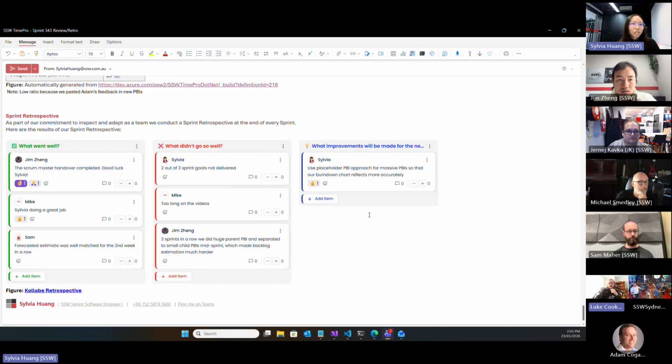So then we can go to the... Sorry, can I just jump in for one second? So this main pain point, Adam, about the PBIs and the burn down being affected and all of that sort of stuff, the crux of it is there's no backlog refinement session.